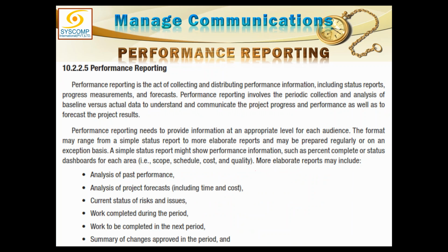Performance reporting is the act of collecting and distributing performance information, including status reports, progress measurements, and forecasts. So what all is elaborated in this report? It can be the analysis of past performance, analysis of the project forecast, current state of the risks and issues, work completed during the period, work to be completed in the next period, and a summary of changes approved in the period.